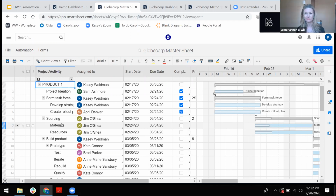I do like being able to see the critical path and understanding any dependencies. That's the one thing Trello doesn't have, is the dependency tracking. Right. Most of the time with Scrum and Agile, you want to bring your tasks down so small that they don't have dependencies in that way. But that's not possible in a lot of work. Yep, exactly. It's not realistic.